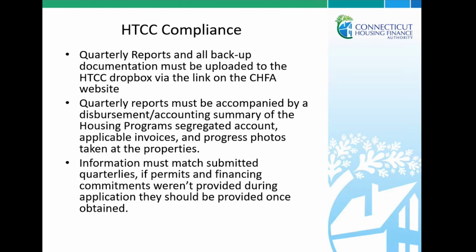The information that is provided must match the submitted quarterlies, so invoices must match the expenditures that are shown in the bank statements and such. And also, if permits or financing commitments weren't provided during application, they should be provided once they are obtained.